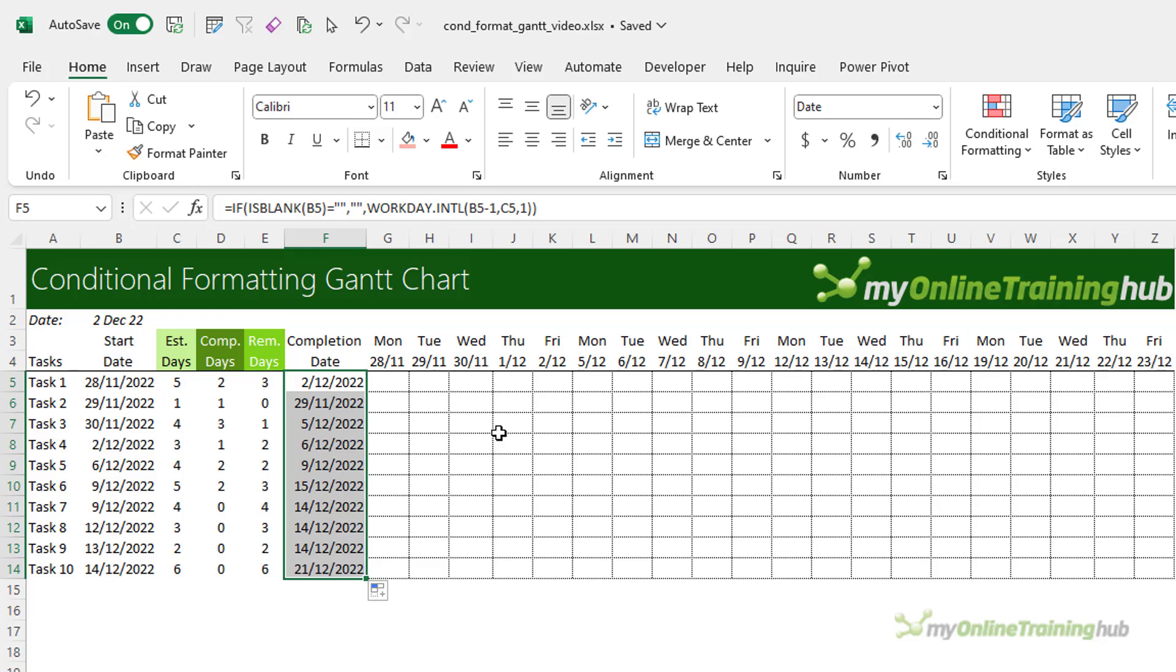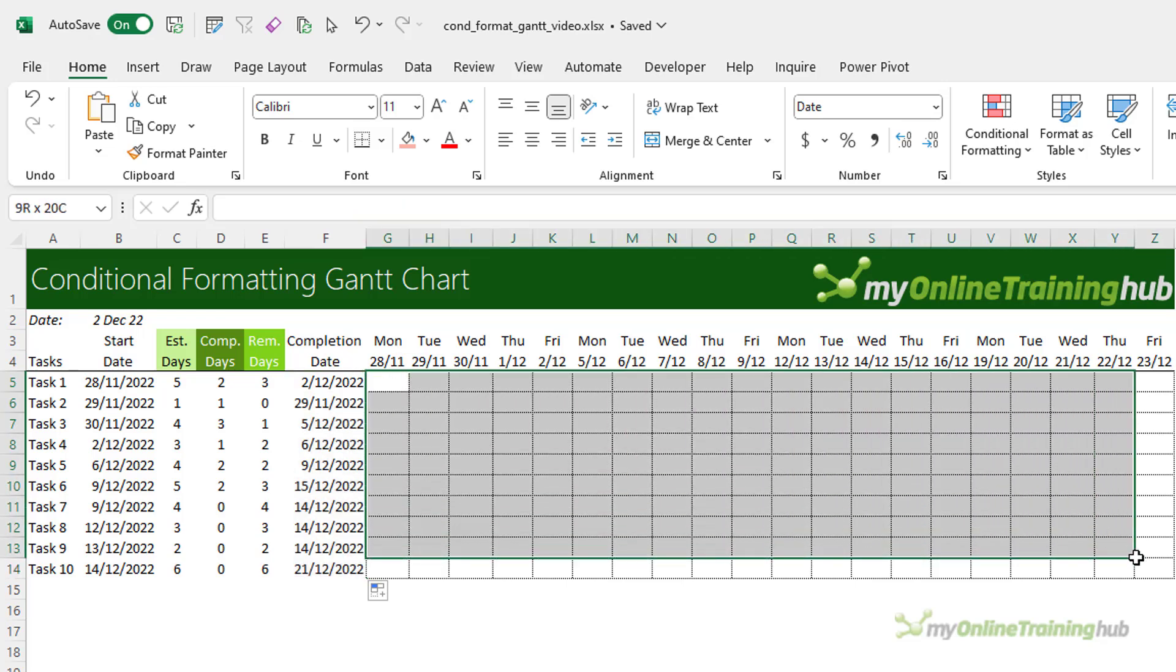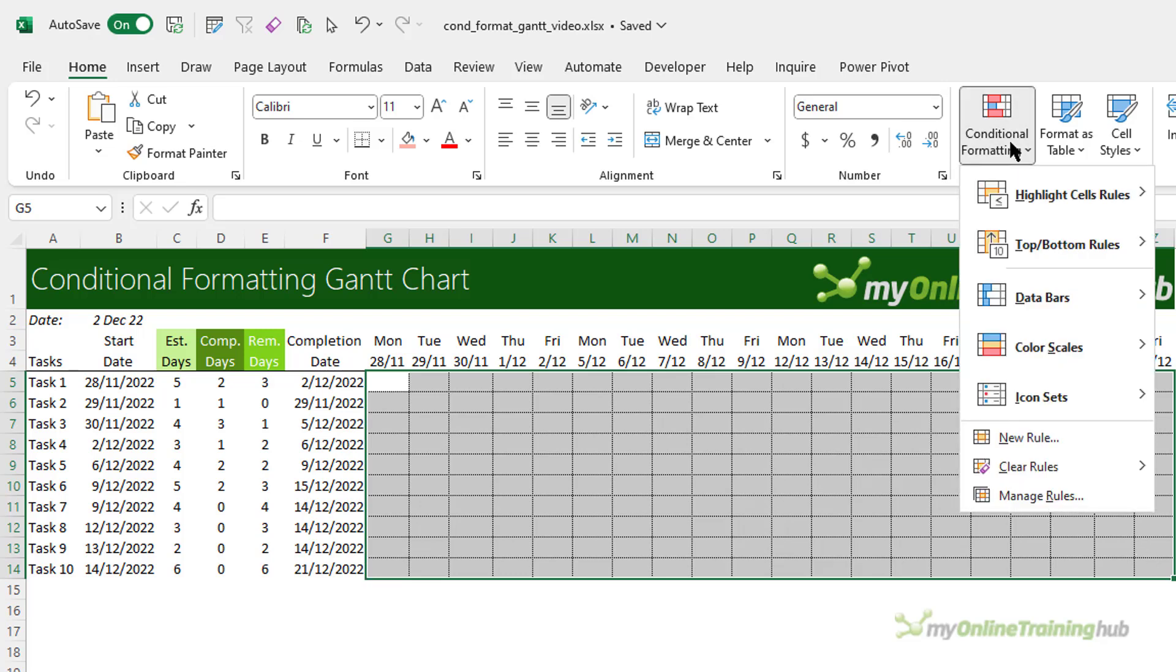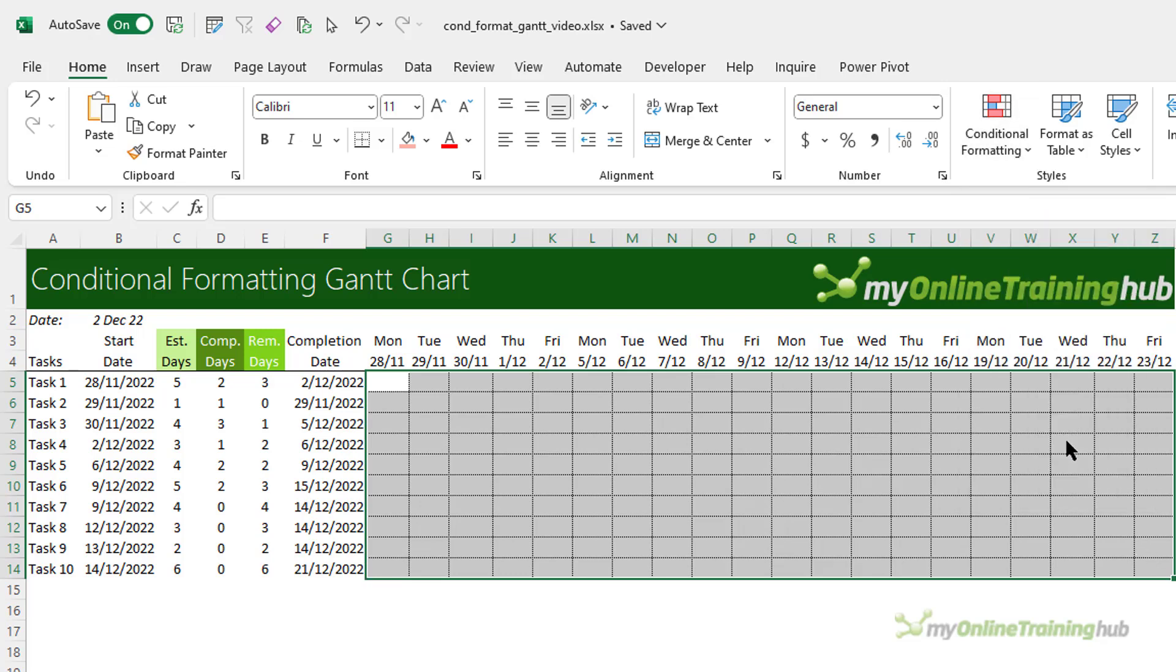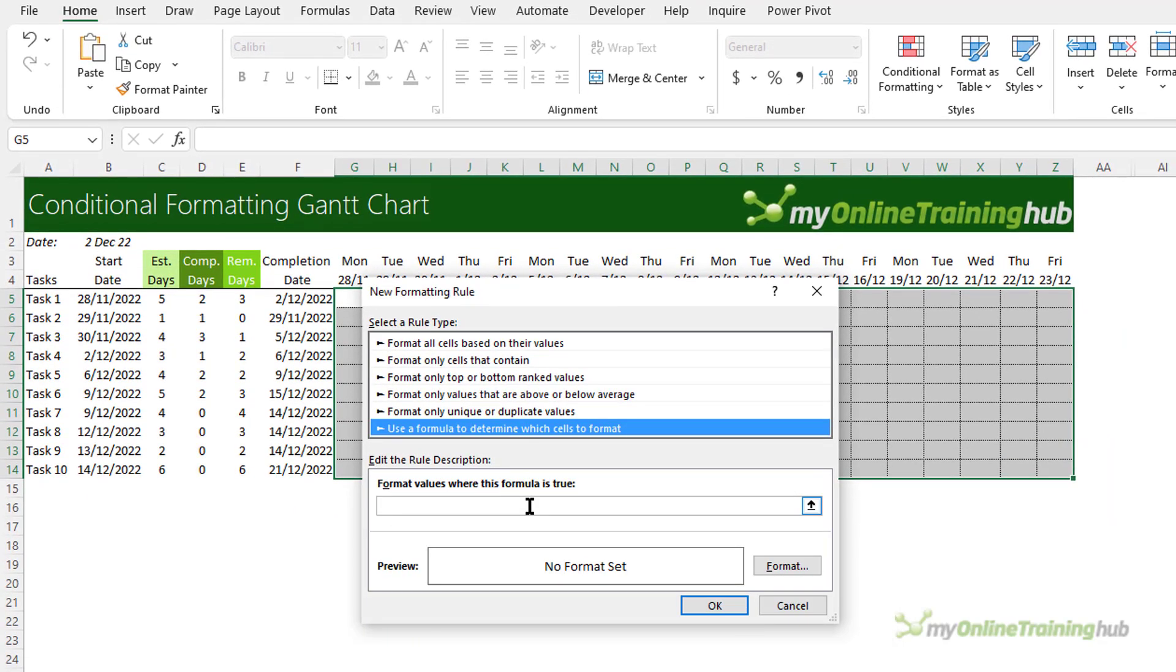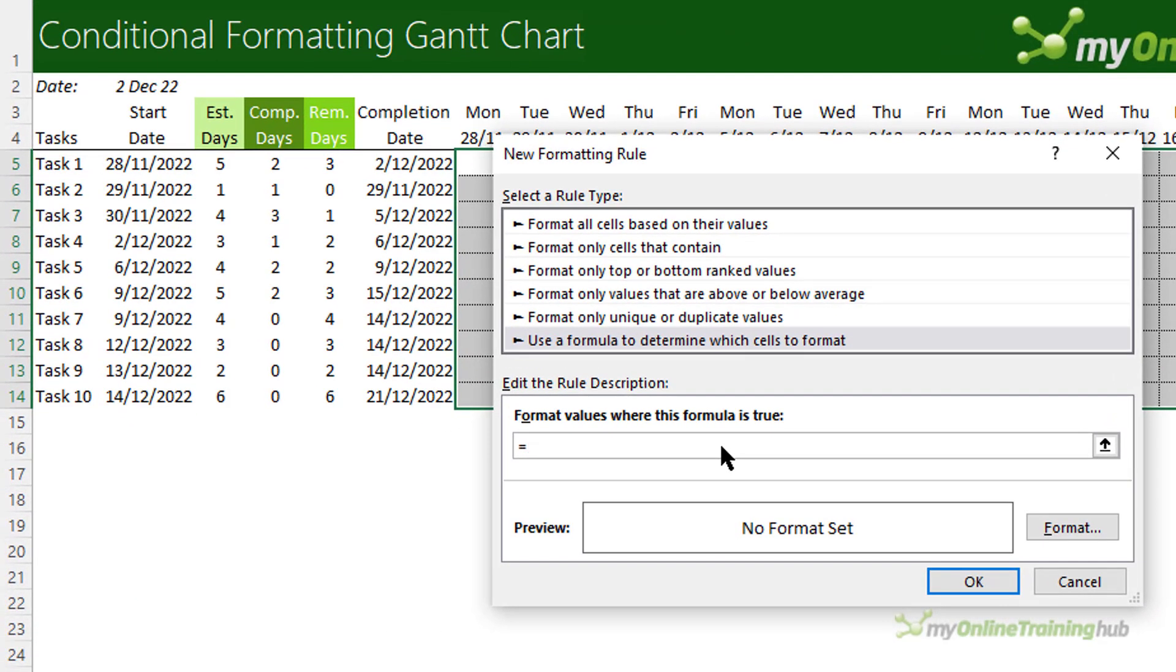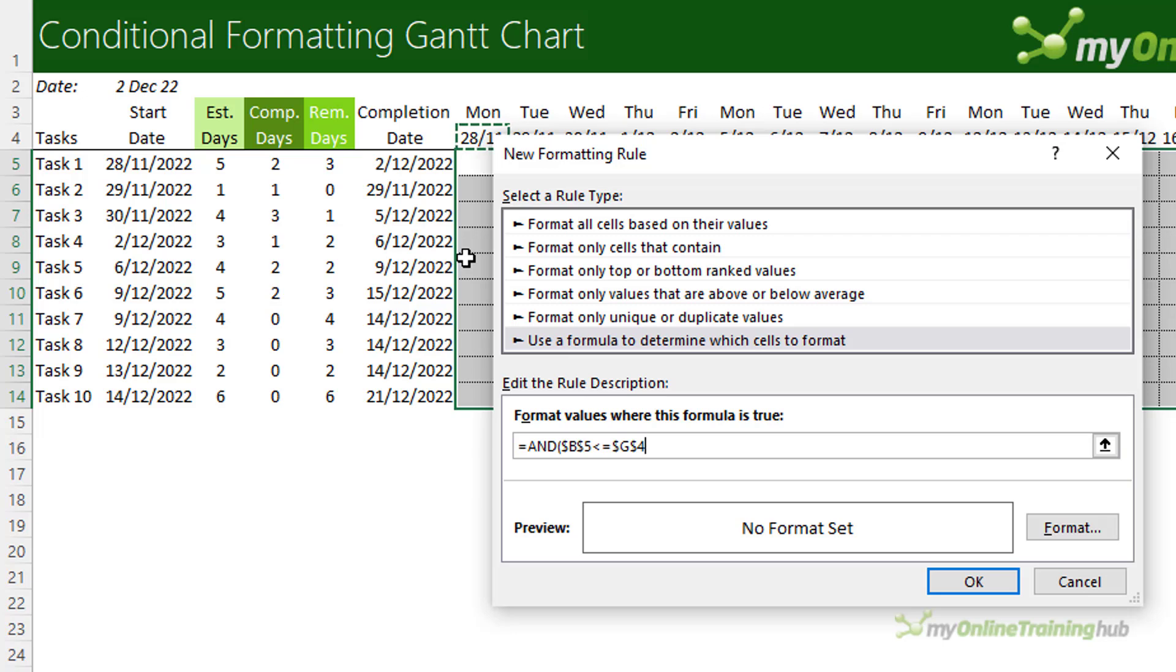So now I'm ready to apply my conditional formats. I'll start by selecting all the cells that I want to format. And then on the Home tab of the ribbon, Conditional Formatting, New Rule, and I want to use a formula. Now there are two criteria. I'm going to start with the AND function. The first criteria simply checks whether the start date is less than or equal to the date in the first column. Now I'm just going to F4 to absolute just the row there. And on the start date, I want to absolute the column.